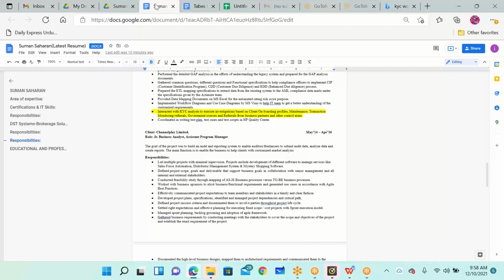As I was just explaining my project with the Citibank KYC, centralized KYC system, we had to build this system for 5 different business units, ranging from wealth management, corporate banking, retail bank, loan, leasing department, and all that. I was interacting with all of these, and the one thing I always do is create a stakeholder engagement matrix where I put down the roles, responsibilities, and timelines for each person to reach out to, the information that I need, and also the relevant questions to ask.